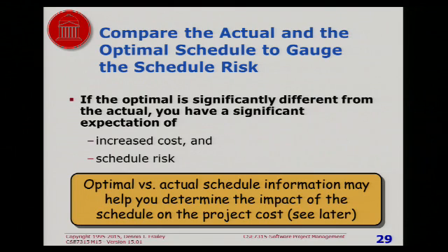it. One of the ways to gauge your schedule risk, if you're a manager, is to say, what do I think the optimal schedule should be? What is my actual schedule? And if they're significantly different, then you have a schedule risk. And that might be something to take into consideration. If you have a schedule risk, maybe you need to start putting in some things to measure how close you are to your schedule and raise alarms if you're getting behind.